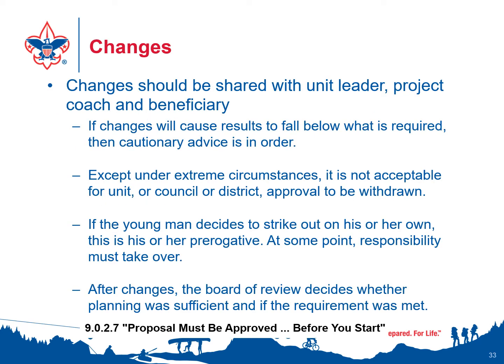Changes in a project should be shared with the unit leader, project coach, and the beneficiary. Again, now we're going to talk about the project coach at the district level. If it is a major change, something where the scout at one time was going to put in a bridge across a trail, and now the beneficiary is saying, well, instead of a bridge across a trail, we decided to pay somebody else to do it and they're going to do it. So instead of you guys doing that, put in a flower bed in front of the headquarters. Well, now the project has changed.